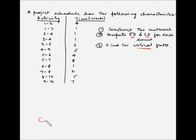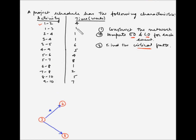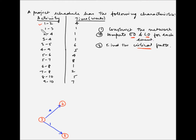This is node 1 and this is node 2. So we have activity 1-2 which takes 4 weeks. The arrow in blue color represents the activity 1-2 and it takes 4 weeks for completion. So we have drawn 1-2. Now next is 1-3. So 1 is preceding event number 3. Let us draw event number 3 and the activity 1-3, which takes 1 week to complete. So we have completed 1-3.